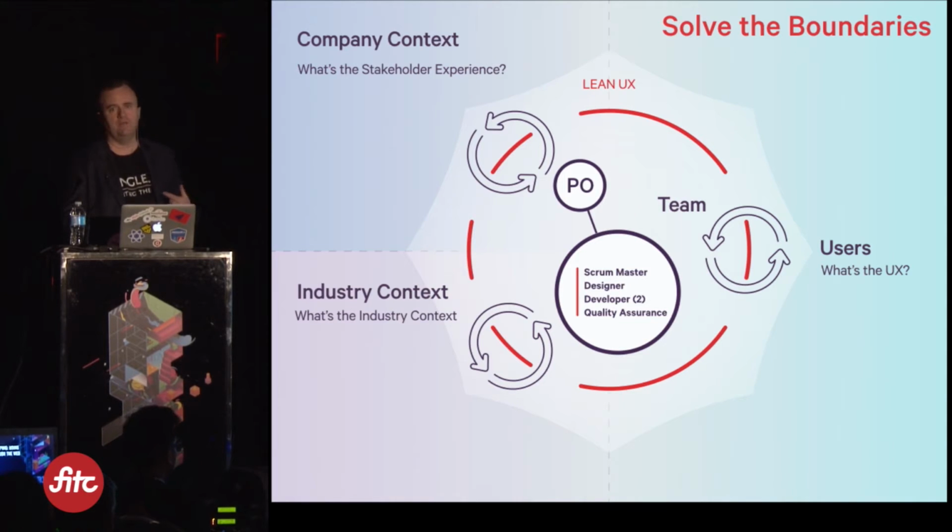If you can shorten that feedback cycle, so you start a project, you have a small team working on it, you do enough UX to start shipping software, and now you're updating your designs, and you're working with the users, and you're working with the analytics, you cut 30–40% of the scope of a potential project because most of it's just guesswork. This is what we think we need to solve these problems. And that guesswork is really being demanded to come up with the scope of the project. And so you end up having the large user experience spec, and that's driving the whole process.